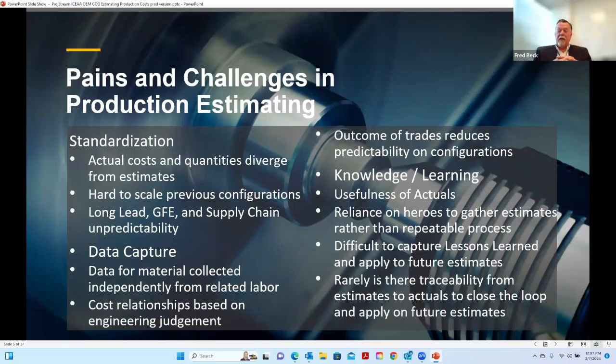But those kind of things can affect your overall system that you've estimated, and these limit your ability to standardize data that you're trying to use from a data-driven kind of approach, and provide that defensible estimate, and be able to execute under the budget that you've allocated. And so it's important in those kind of aspects to make sure that you've got some margin built into those estimates. And sometimes you're allowed to do that on proposals, and sometimes you have to figure that in as a way to make sure that you can execute and not expose risk there.